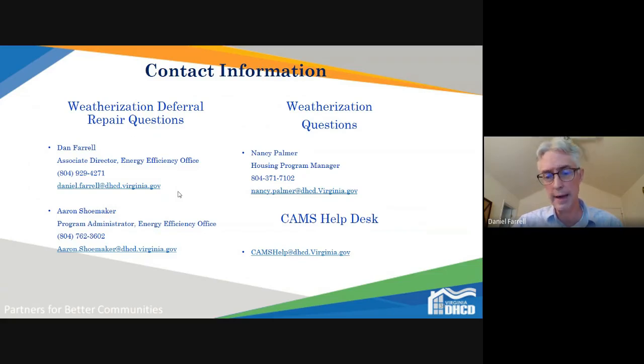Now, on the other side of that, you're not under any obligation to spend all the funds in year one. As we've said to you before, we understand that there's going to be a ramp up period for this program, and we can roll funds that you have at the end of the program year over into the next year. So we have some flexibility on the other side of it as well.